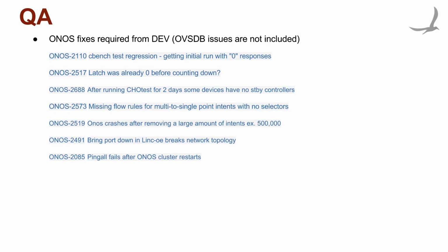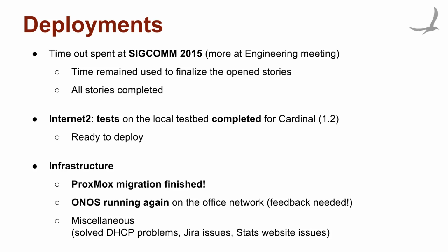Okay, I'll just go. So we started out the sprint with some of the leftover stories from the previous sprint, and this time we tried to keep it to a minimum number of points by looking at the last sprint, because there were so many points untouched, not even in progress. So we tried to pick up very few stories and few tasks along with some new stories added.